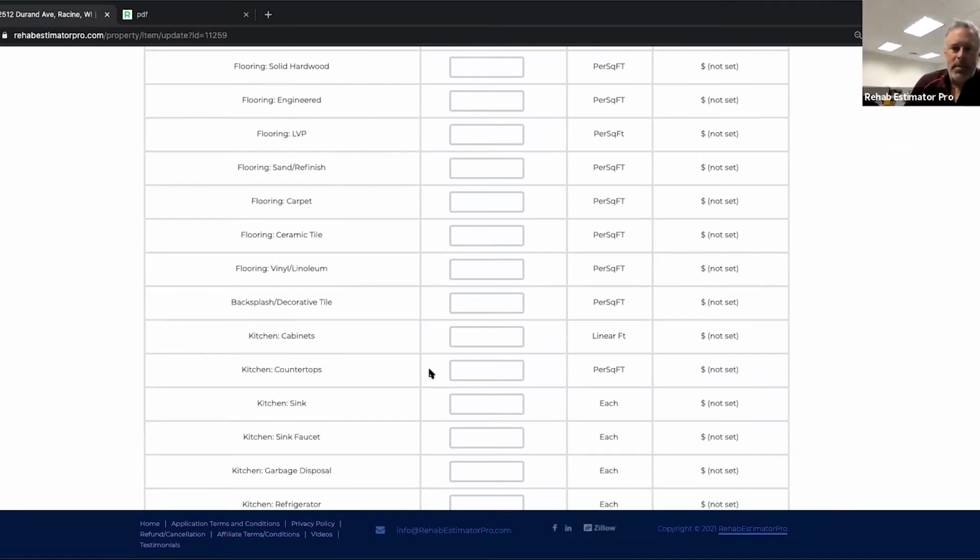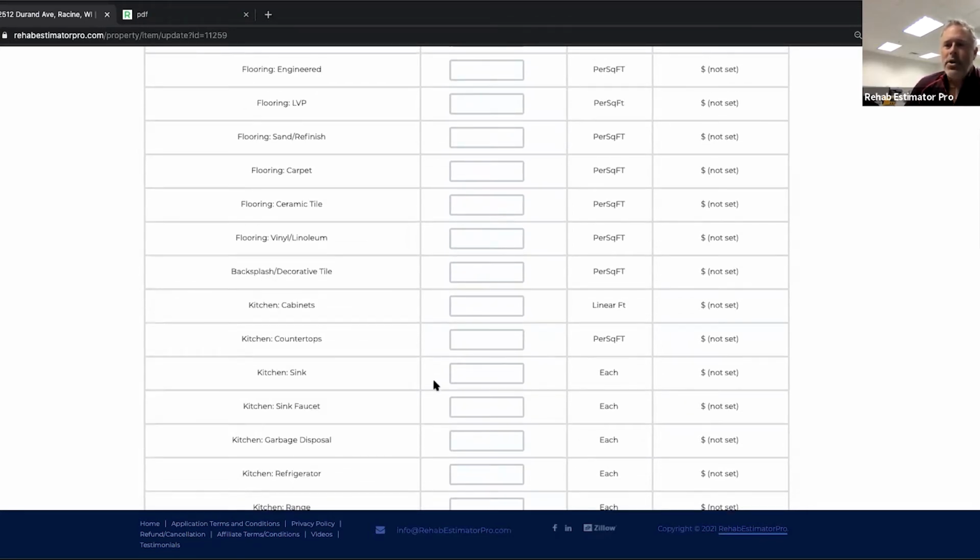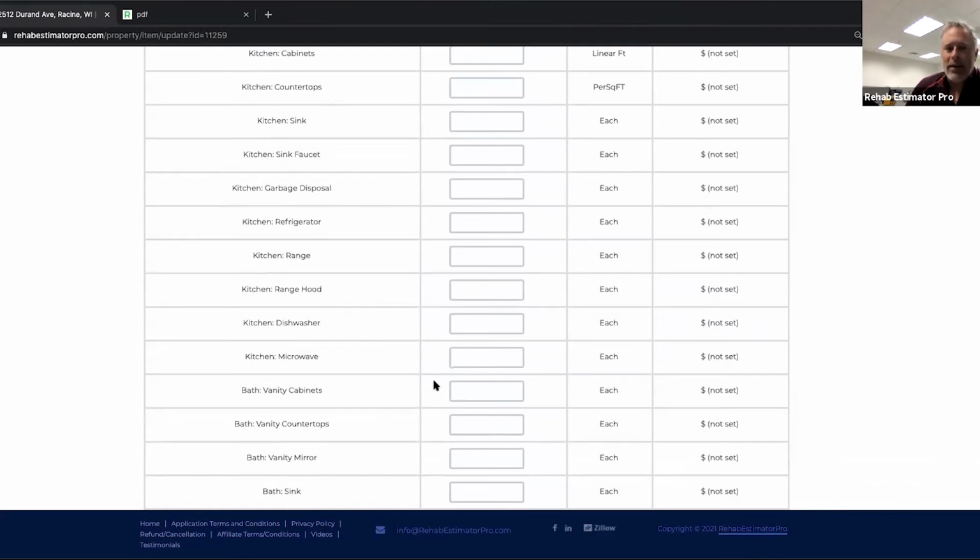Yep. And on the front end, you don't even have a tape measure in your hand. You're walking through the house and coming up with a number. If you're really getting into the nitty gritty and going, well, geez, the cabinets are okay, we just need countertops in here. Now, what I do in there when I'm coming up with a number, because the seller is expecting you to offer them money for their house, is I'll just toggle the number down for the kitchen. So instead of that $6,000 median kitchen that's going to do everything, I might just go 50% and go $3,000 for the granite and the new sink and faucet. Instead of starting to put in square footage of the exact countertops, I'm there to get a number and work that quick. Okay. Does that make sense?